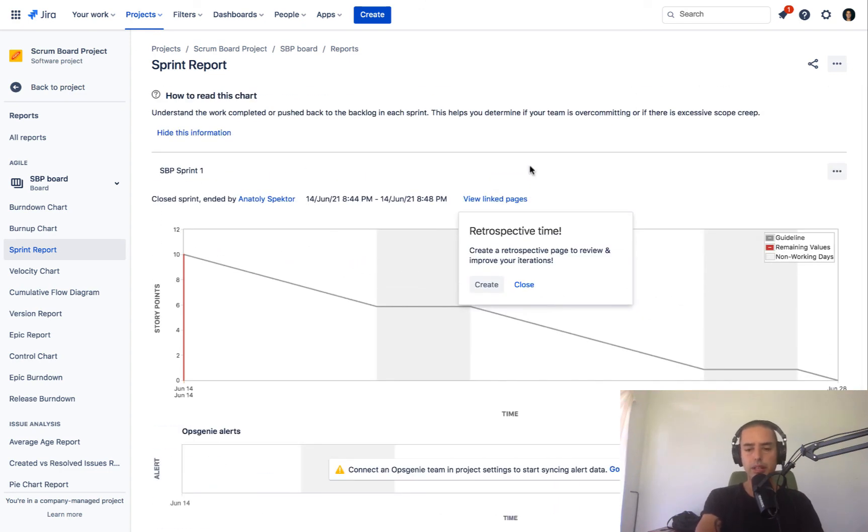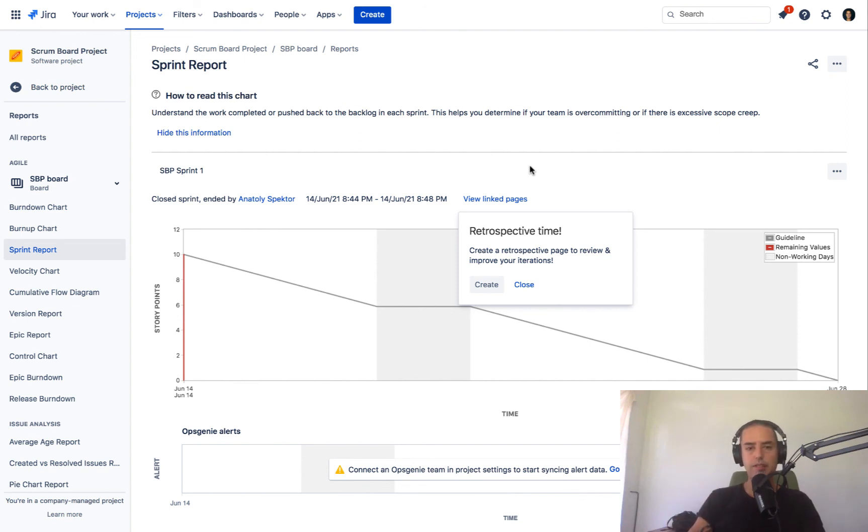So Sprint 1 was deleted. All the data related to it was deleted in terms of information. Stories are not deleted. But the fact that they were part of the sprint will be.